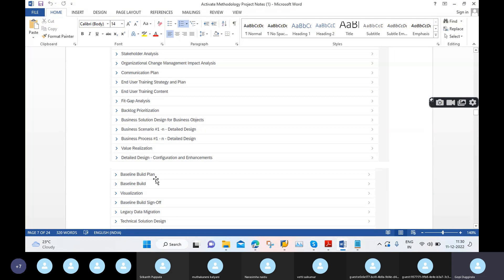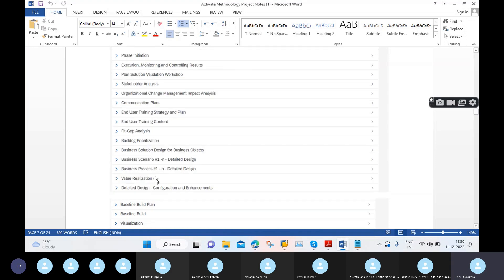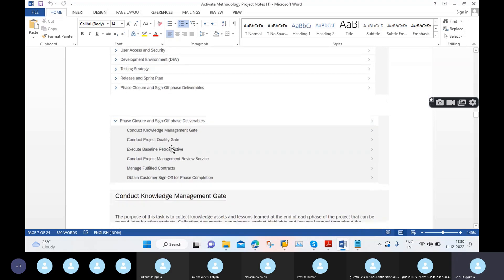Generally at the real-time level, configuration is set up across what we call three build rounds. For example, in my organization we treat our build as DR1, DR2, and DR3. In DR1 we configure the baseline configuration. In DR2 we configure the country legal requirements. In DR3 we maintain the customization and enhancement part.